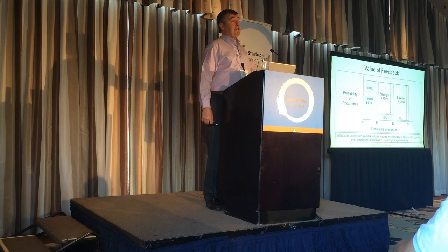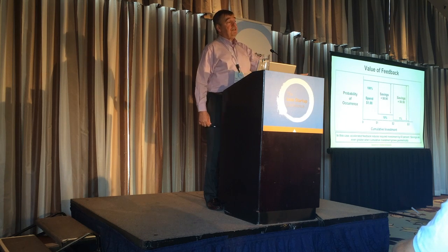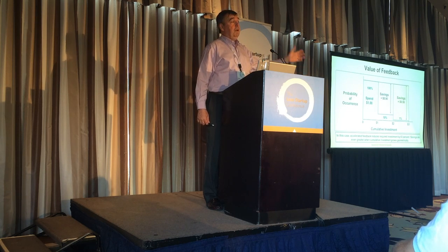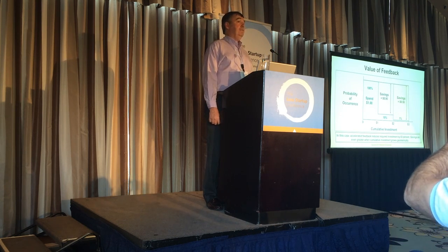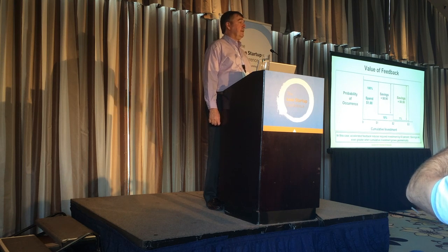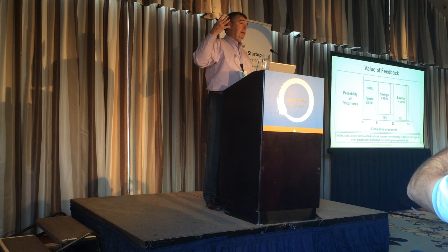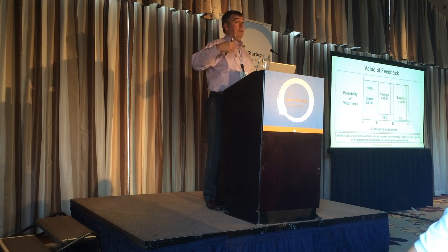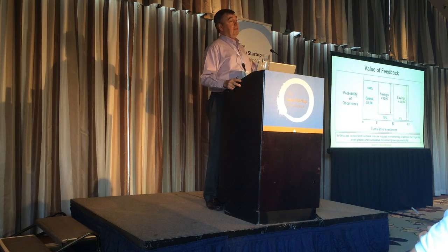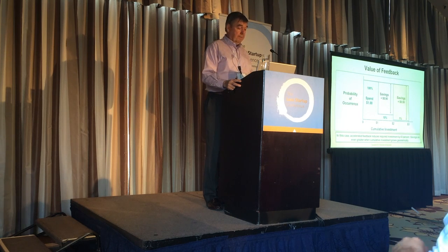This is just batch size reduction. I'm reducing the batch size in which I'm buying information, which allows me to economically exploit the information. This is how lean startup works. Any of you doing lean startup would automatically recognize that this is what you're doing. You're creating value by being able to shut down unproductive paths early or being able to put more resources behind productive paths. In financial theory, we call this an embedded option. Embedded options can be quantified in value.